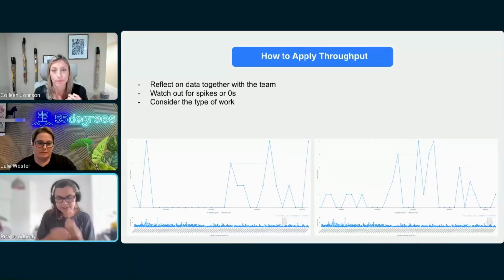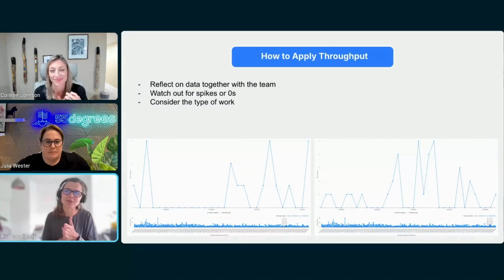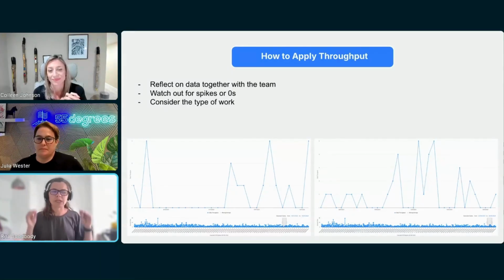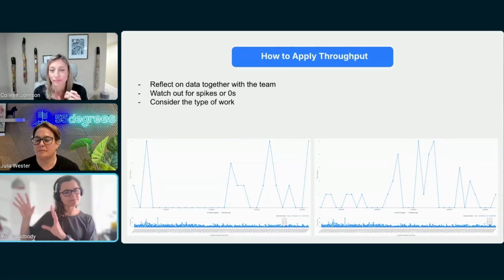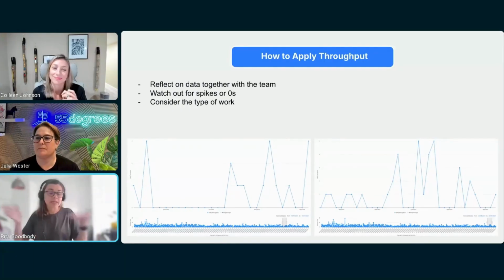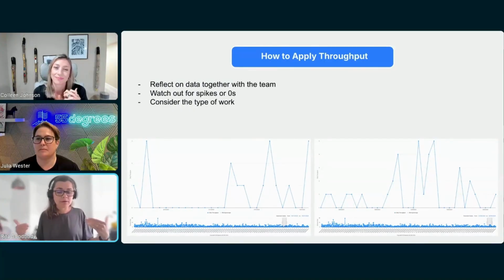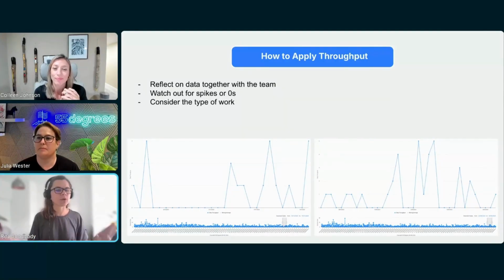So forecasting basically saved our lives at SpectraX. When I joined SpectraX in 2022, I was told we have this very important feature. It needs to go out as soon as possible. That's one thing, biggest focus. Everybody was aware of that. The closer we got to finishing, there popped up a wishful date in mind. We should really deliver this by that date. It happens. It's normal. And that's where we started to look: if we want to deliver by this date and we still have that many items left, it very quickly showed we are not going to make it. That's just not going to be possible.